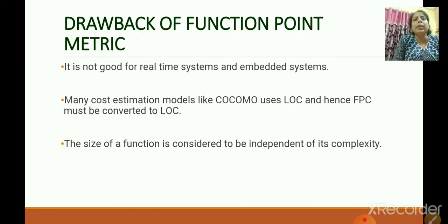Then the drawbacks of the function point metric. It is not good for real-time systems and embedded systems. Many cost estimation models like COCOMO use LOC, and hence the function point count must be converted into LOC. Most widely used cost estimation techniques use LOC.